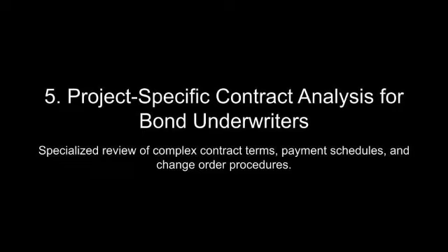Practical implications and real-world scenarios. In practice, the enforcement of liquidated damages clauses often leads to disputes that test the limits of their proportionality and applicability. One common scenario involves project delays caused by factors beyond the contractor's control, such as late approvals from regulatory authorities or unforeseen site conditions. In these cases, project owners may still attempt to enforce liquidated damages, arguing that the contractor should have accounted for such risks in their project planning.